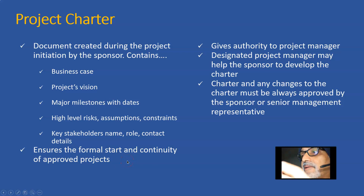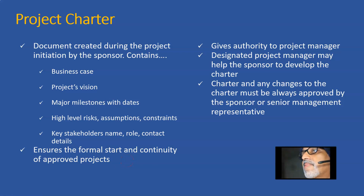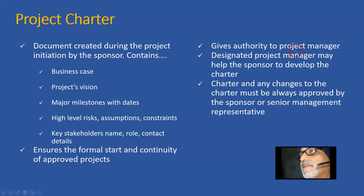It ensures the formal start and continuity of approved projects — that means it allows only the approved projects to take off. It gives authority to the project manager, because this is one document where the project manager's name, roles, and responsibilities are defined and approved by the senior management. Hence we say that this gives authority to the project manager.